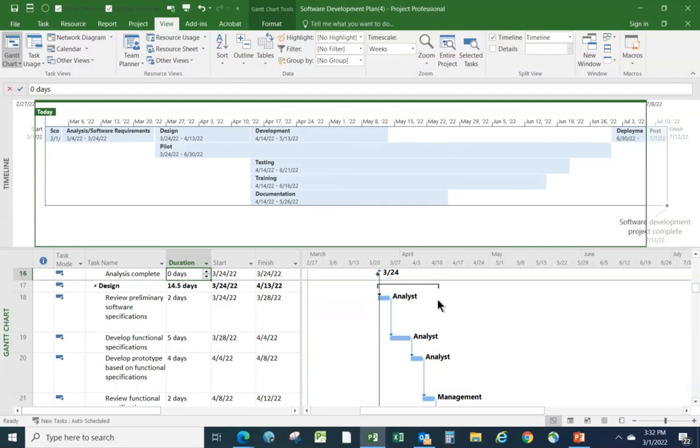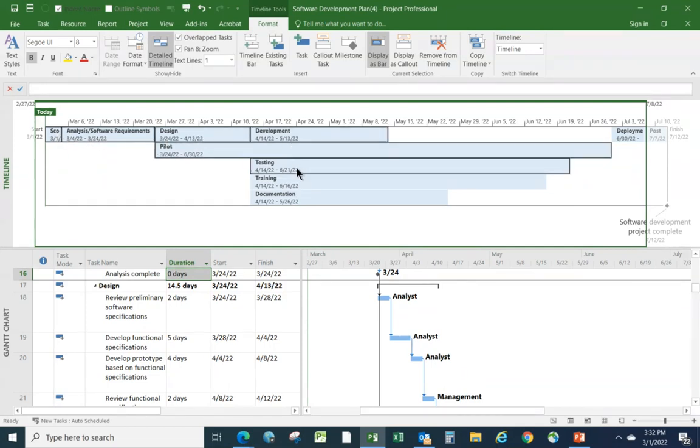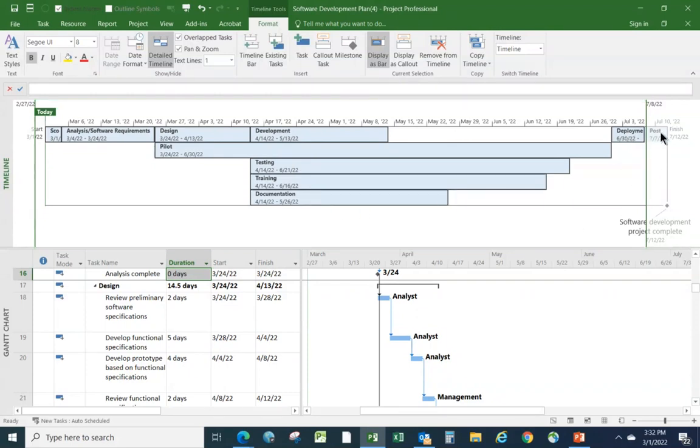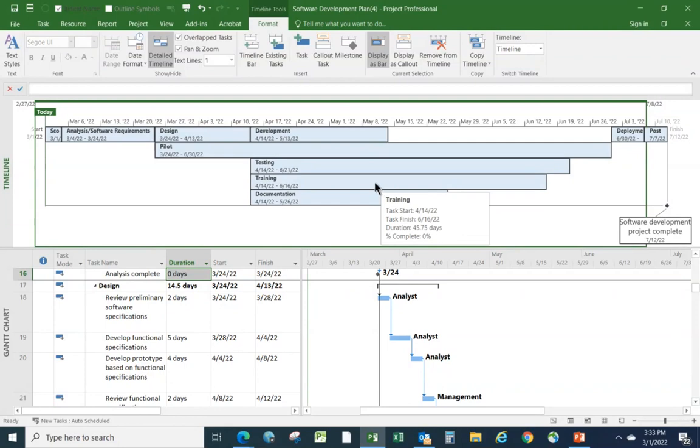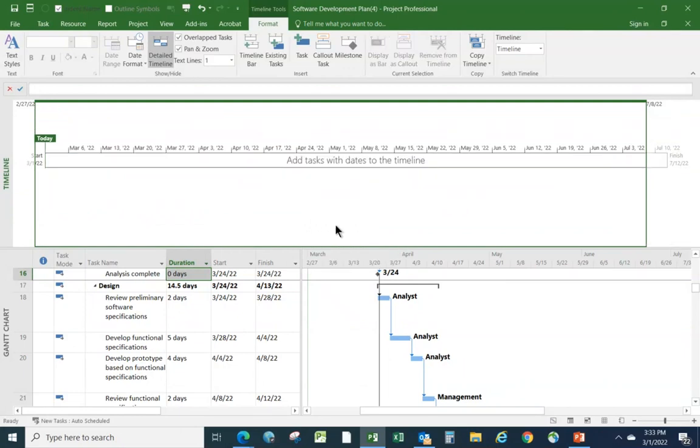So let's do a couple of things. Let's select in the top here, select one of those items, and then Control select all the others. I'm going along here, I've got my finger on the Control key, and I'm just clicking on these items, including this down at the bottom here. And when I've done all of that, I'm just going to right click on one of these and say remove from timeline. And that basically takes everything out of the timeline. We now have nothing in the timeline.